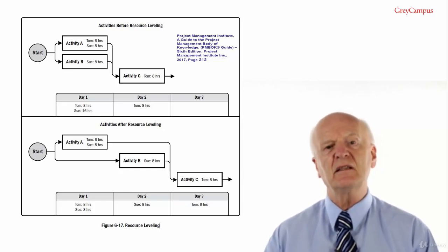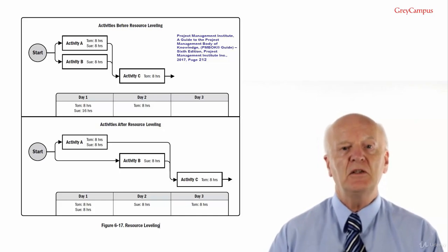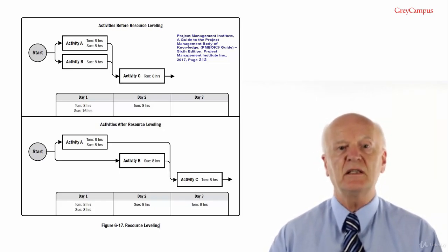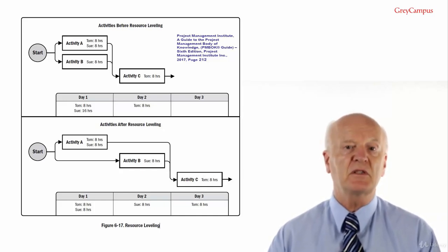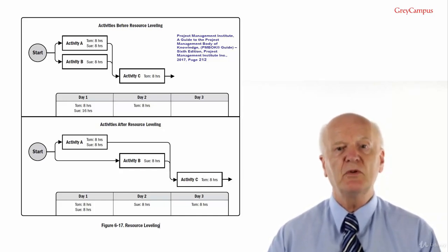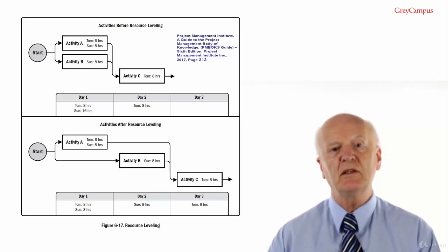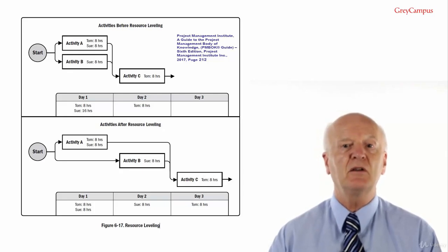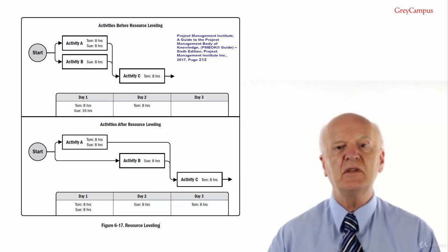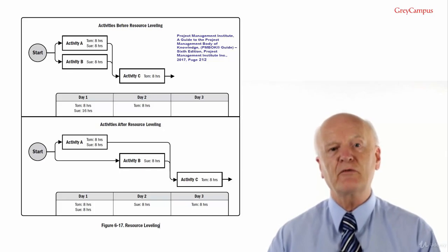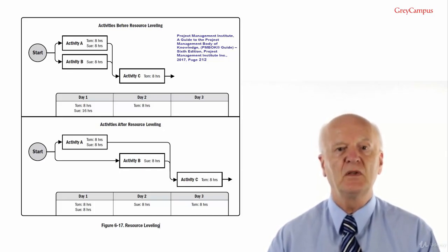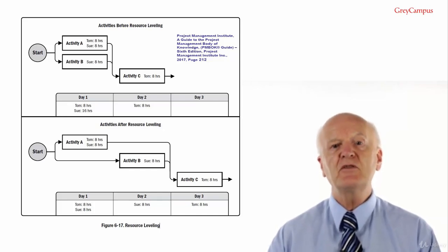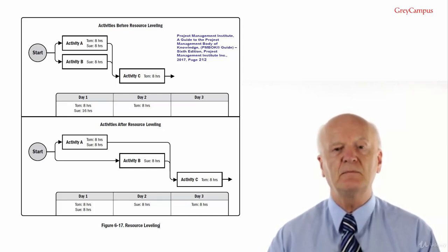Resource smoothing is a technique that adjusts the activities of a schedule model such that the requirements for resources on the project do not exceed certain predefined resource limits. In resource smoothing, as opposed to resource leveling, the project's critical path is not changed and the completion date may not be delayed. In other words, activities may only be delayed within their free and total float. Resource smoothing may not be able to optimize all resources. Please remember the differences between the two for the exam.